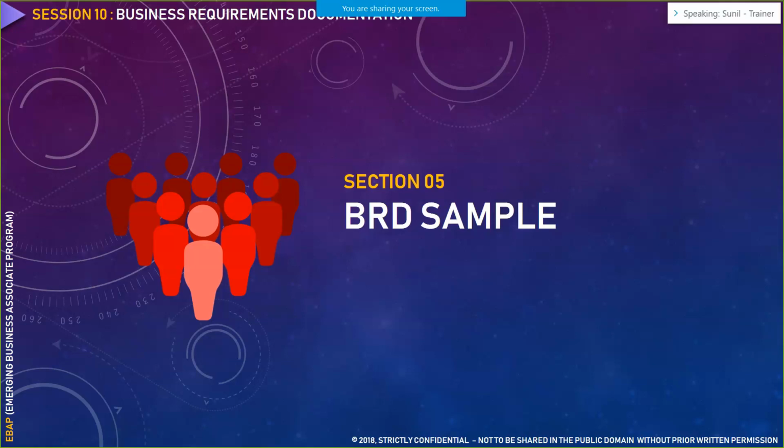Essentially there are two stages associated with it. One stage is before development, when you are in the analysis phase. So when you are requesting change in the analysis phase, at that time developers are not involved. So once the development starts, then when you are discussing with them and the development team asks for a change, then that would be a BRD updation on the basis of developer feedback, because the developer is also a stakeholder.